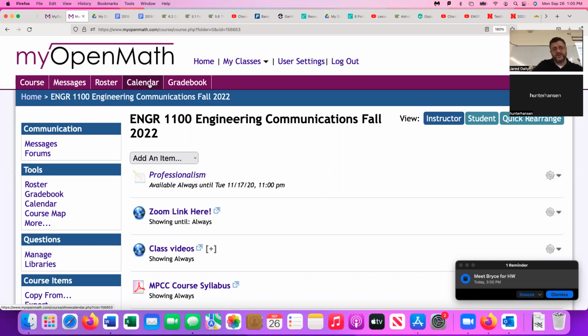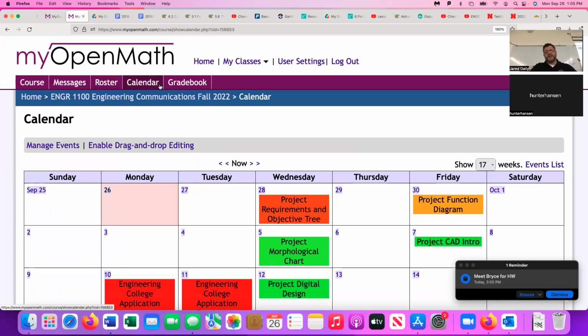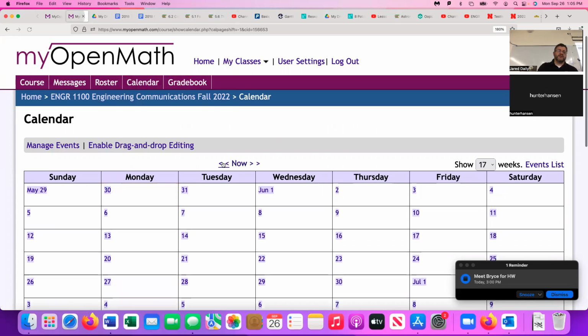the project is by talking to whoever it is that you're doing the project for, and made a list of tasks that you think you would need, general tasks, very general tasks that you think you need to do to complete this project. When I mean general, I mean quite general. We're talking about we don't want to be doing a project about building a bridge and talk about laying out a particular pattern for rebar or something, or deciding on a pattern for rebar.